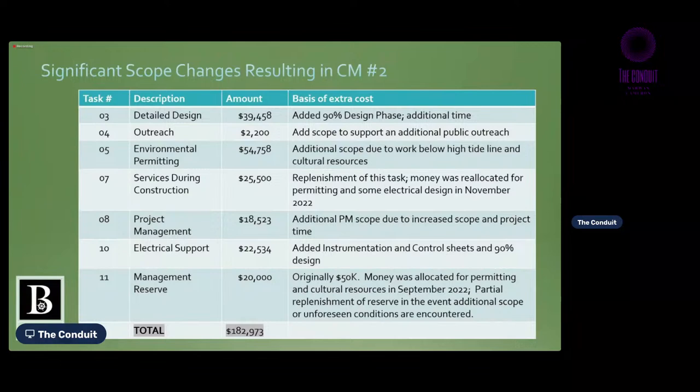So Parametrics had to hire a new consultant, which took time for them to get up to speed, but they've been very resourceful and helpful for us. One of the side benefits of all this is that there's more collaboration with the Suquamish tribe. They recently provided some input on a development project that we did in the area. They gave us some insight and helped us put together an inadvertent discovery plan in the event that anything was discovered during the excavation of the water main connection.